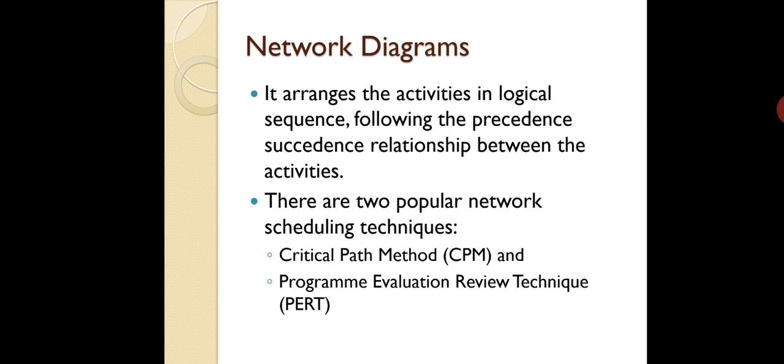So PERT we use for more of research and development projects where activity time is not known with certainty. So in the question of PERT, you will be given 3 time estimates: optimistic time, most likely time and pessimistic time. So for example, we can use CPM in the construction project, whereas PERT can be used for research and development projects.